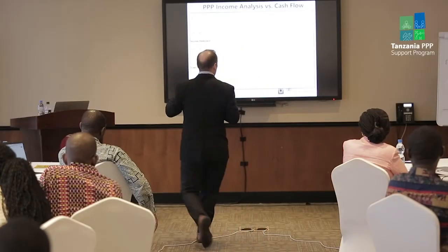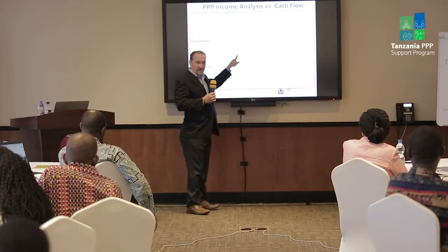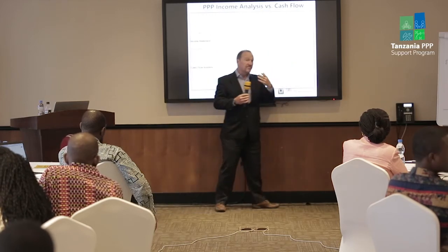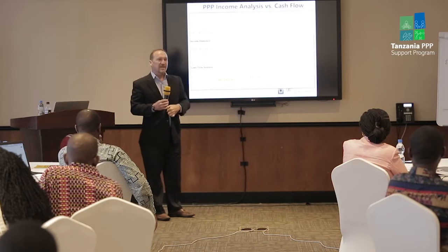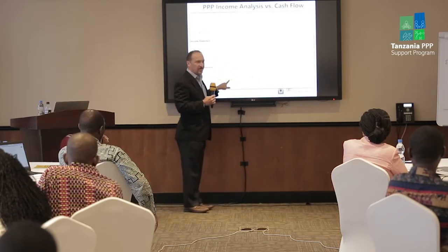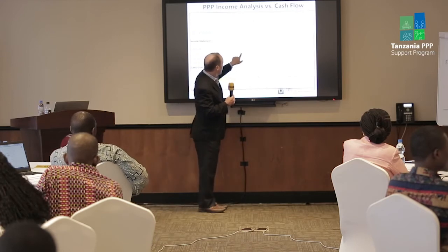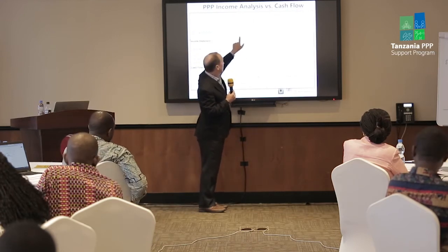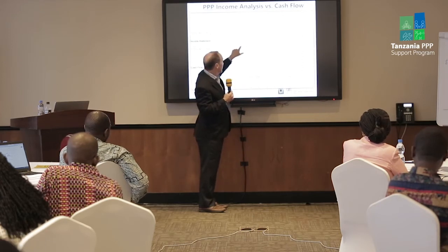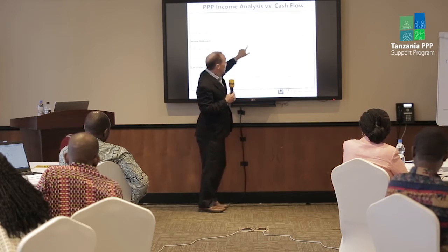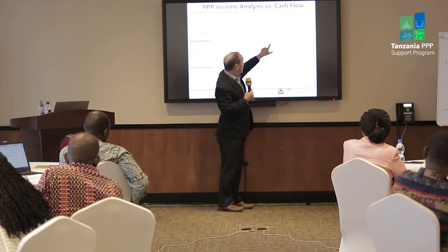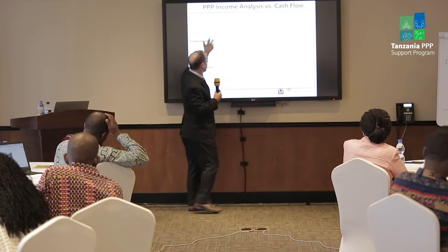The amount of interest you pay, if it's levelized payments, most of that is interest. As you pay down the principal, your interest payments get less. So you will find that even when everything else is held the same, your interest payments are going to change over time. And when you come up with the formula, it's not a simple formula like maybe the IRR, as we'll see, but you actually have to say, this is the interest payment for this year. One of the inputs in this formula is the year. Similarly here, the 6.99, that's the interest payment specifically for year 5 in a 10-year loan like this.